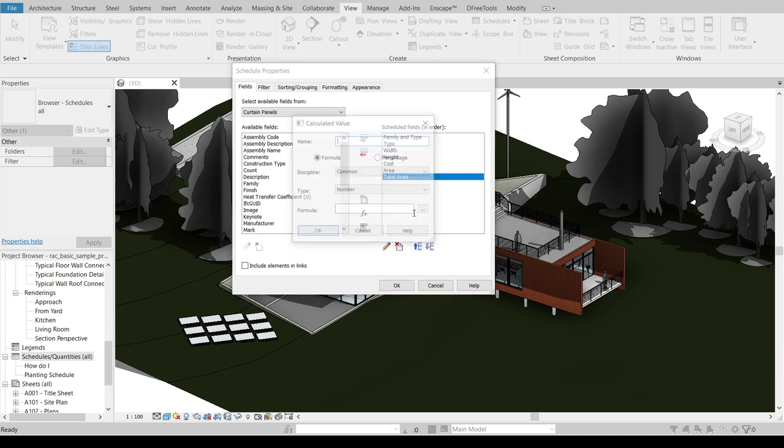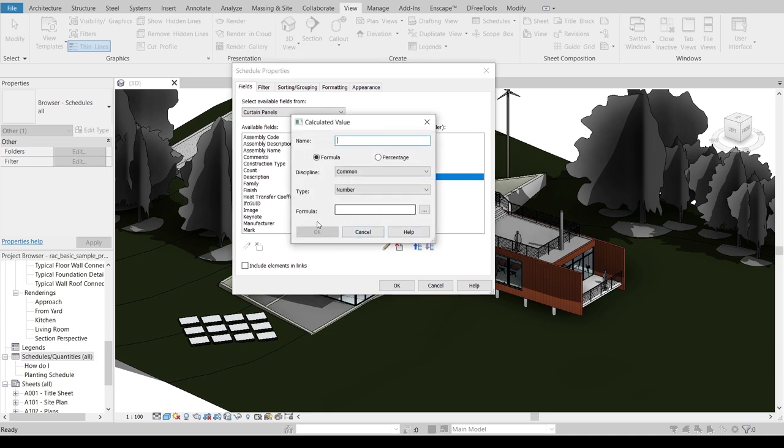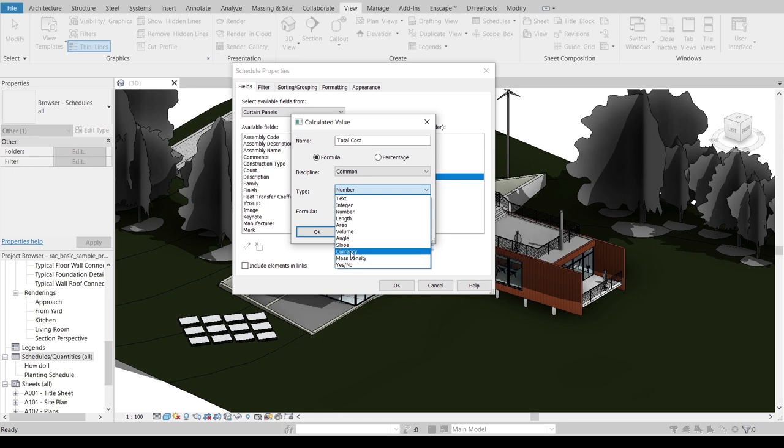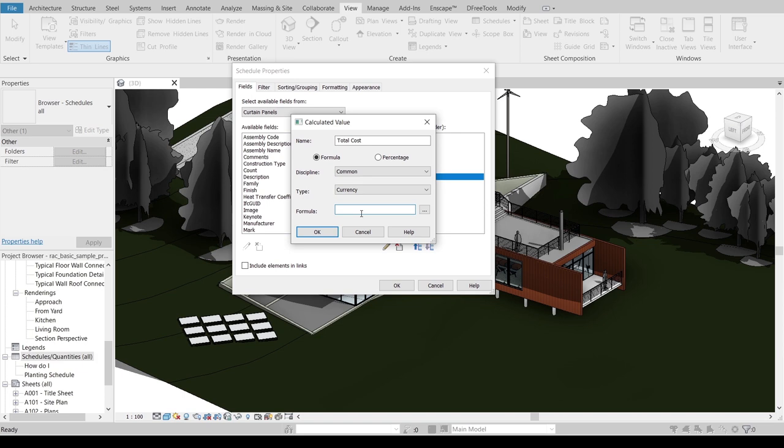Again, I need to create another formula there. Here I'm going to make it Total Cost, change our type to currency, then I will change it to formula, make it Area times Cost.